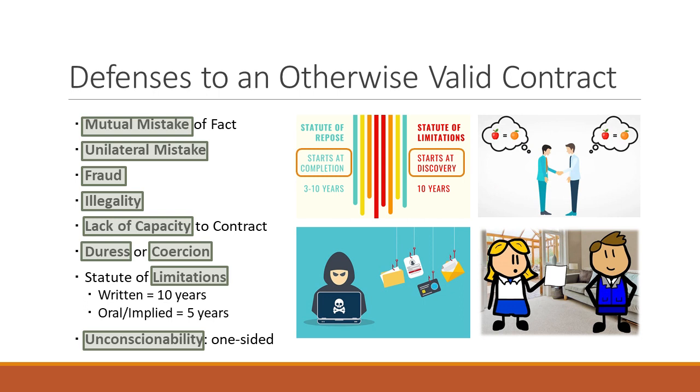You can use that, again, as the original mutual mistake, but I found out, and as a result, I'm going to charge you more, and the owner should not be able to demand that you do it for the $150,000. If you have to put in more time and services based on this mutual mistake, whether it was on reliance or just the conversation, you should be able to, at a minimum, modify the contract, but if you want to walk away from the contract, you could, because a mutual mistake is a defense. But,